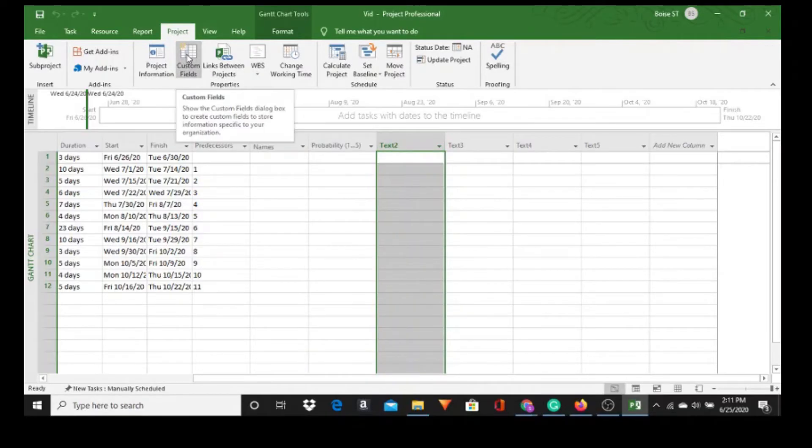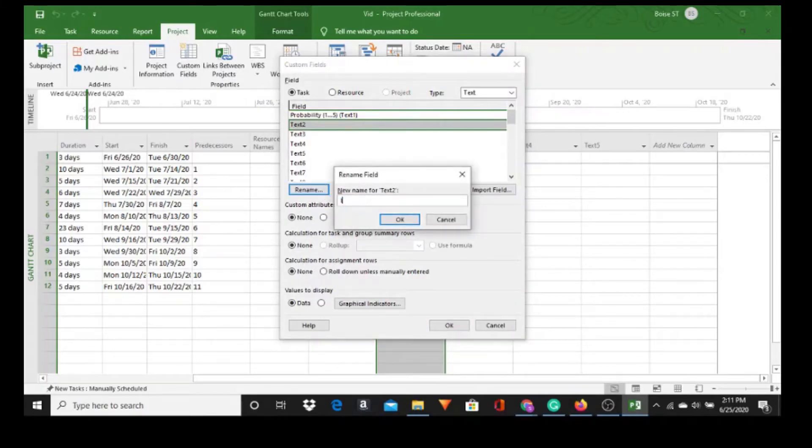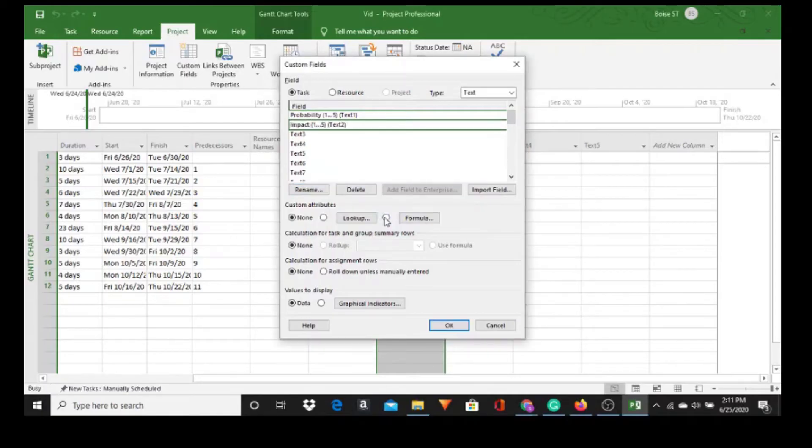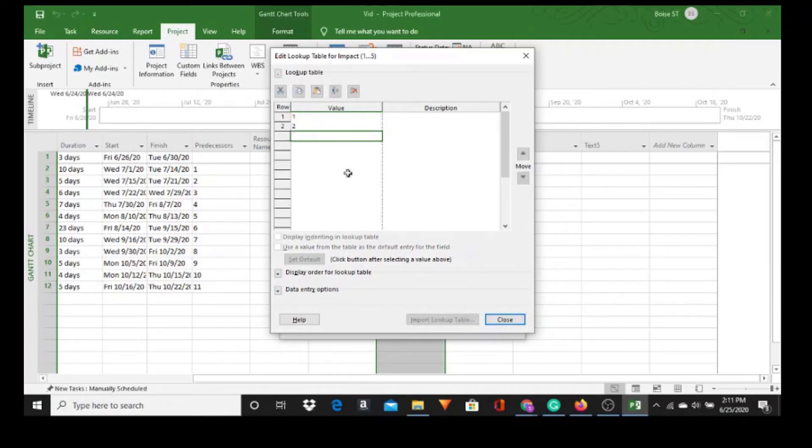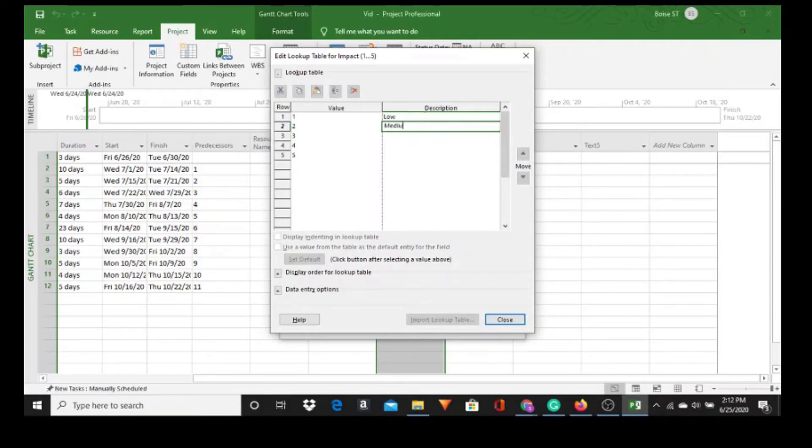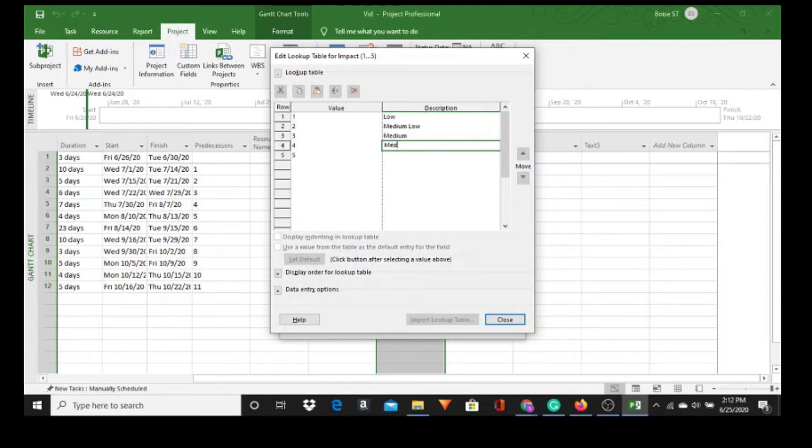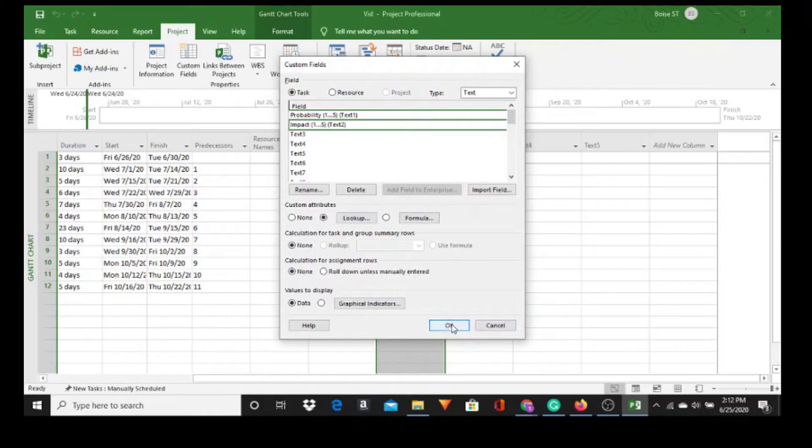Highlighted, Custom Fields, because risk register is all about custom fields. We want to call this Impact open parentheses 1 through 5 close parentheses. I want to do the same thing, so go to Lookup, sense of values, description, and High, and close and OK.